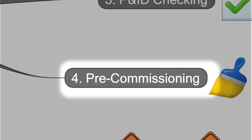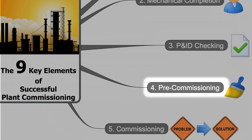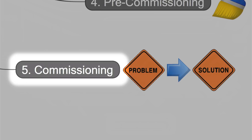The fifth key element is commissioning. This step includes, for example, introduction of utilities, dry running trials, hot running trials, safe fluid dynamic testing, solvent dynamic testing, and process fluid tests. Now we will face a lot of problems to be solved before key element number 6.